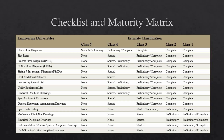The table also shows how design maturity grows across AACE estimate classes. In Class 5, a block flow diagram is started or a preliminary version exists, but most deliverables are non-existent. By Class 4, started or preliminary versions of core documents exist — process flow diagrams, utility flow diagrams, and equipment lists. In Class 3, almost all process deliverables reach preliminary or complete status. Class 2 tightens everything up: all process documents are complete and discipline drawings reach preliminary or complete status, with even spare parts listings appearing. Finally, Class 1 is surgical precision — every deliverable is complete, except some discipline drawings might still be preliminary.